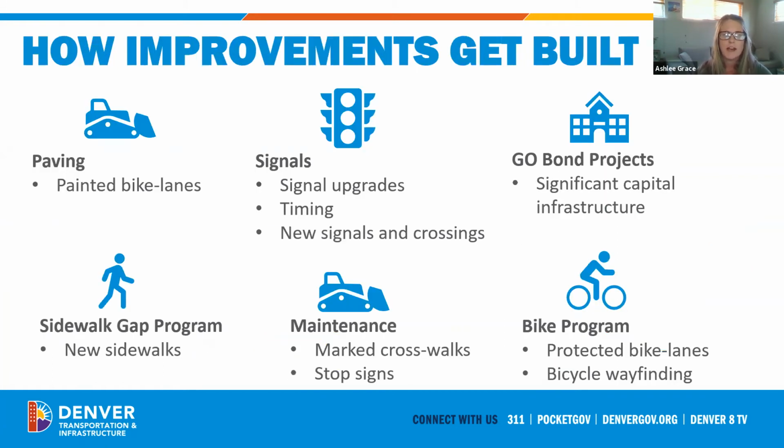This is just a snapshot of how some projects get built through DOTI. There are even more ways that we build projects, but I just want to highlight that one of the main ways we are able to implement a lot of our bike projects is through our paving program. Our paving program is a huge driver for the work that we do at the city. We have to pave some roads at least every 5 years, if not more. So that is something that's constantly going through the city.